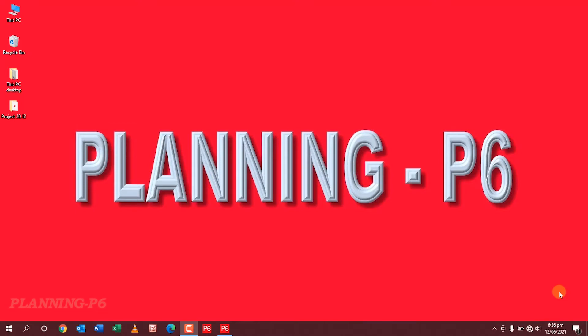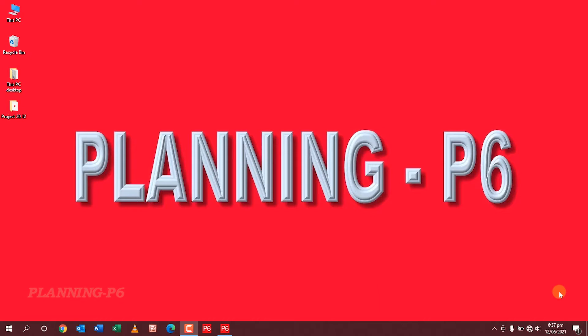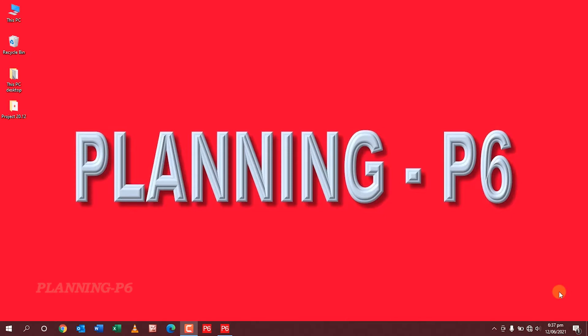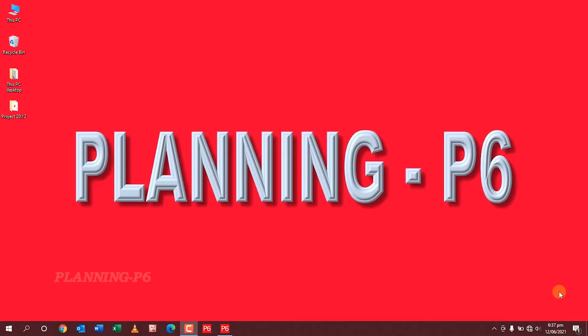Hello friends, welcome to your own channel Planning P6. Today we will learn about how to import an XER file from an updated version into an old version. An XER file is the native file format of Primavera P6. As P6 users will know, you can only import XER files that are of the same version or older than the version of P6 you are importing to.